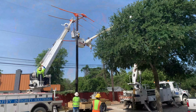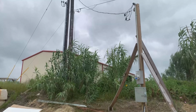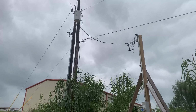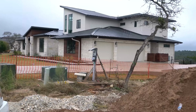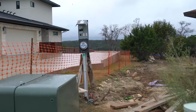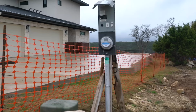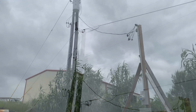Electricians have to come in and create something called a T-pole, or a temporary pole. It's usually a pre-constructed pole that could be, I don't know, maybe 16 feet long, but typically we're talking about just a large pole that we put a huge disconnect and a huge meter on, and maybe we'll put a panel with some receptacles, all of this stuff on this pole, and we'll set this thing up at the corner of a job site so that every trade has access to power.